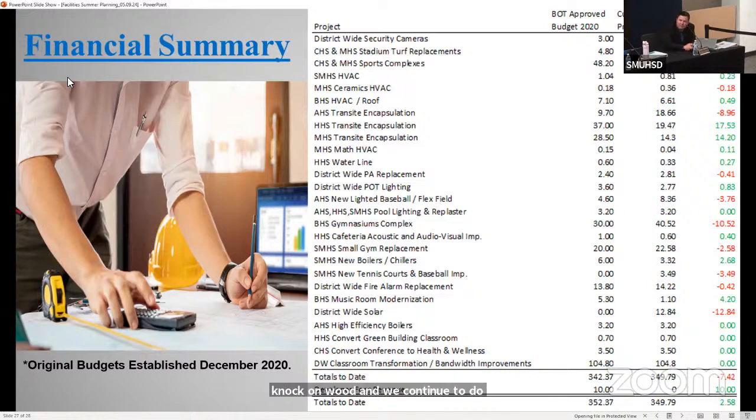will have some decisions to make in terms of the contingency dollars that were there on an as-needed basis. So there potentially is some contingency money, but we won't talk about that until we've really bid out the classroom transformation projects, because that's $100 million, and even a 15% change in the cost of that is another $15 million.